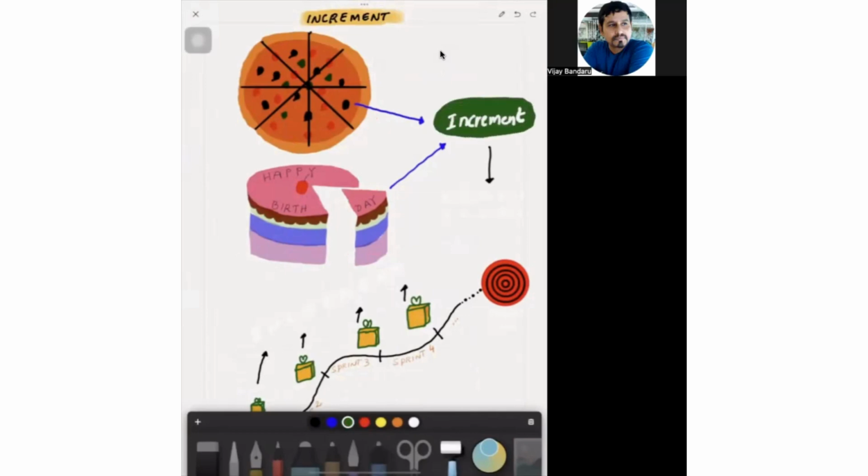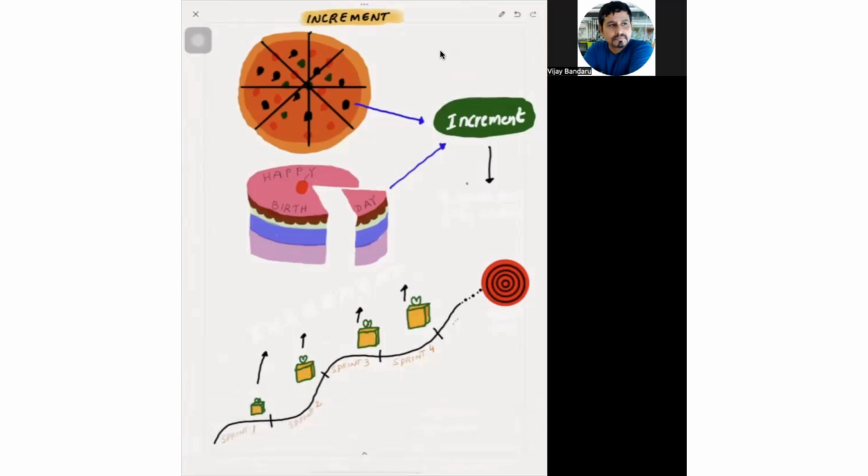That means whenever you are building any product, it can be a house or a mobile application or a web application, then an increment is a usable piece of the product. For example, if you are building an e-commerce website, then probably you build a small important functionality, a set of features which includes registration, login, search, add to cart, payment, and track the order. These 5 to 6 features together, when they are completed, are called an increment.